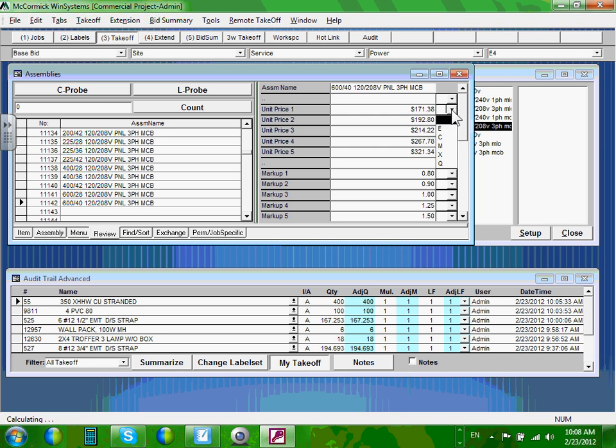For the panels, I'm going to code the panels, so make the panels coded. All your panels and all your lights will be coded. What does that mean? It's going to be price only, no labor only. So when you hit the Q, how many panels? I have 1 panel, and hit enter. I have taken my 500 amp panel. And don't sweat it hard. It says 40 circuit breakers and so forth. We're taking it as a price only.